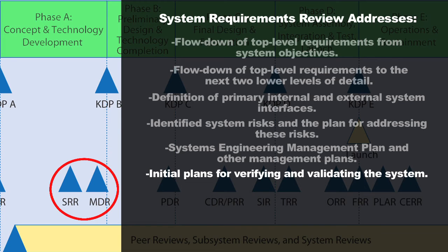As you start to define requirements and objectives, you also have to start thinking about how, at the end of the life cycle, you will ensure the system performs as intended. Will you do that through testing or through computer modeling? You have to think this through early because you might need to build special tools and special equipment to perform that verification, and you need to make those investments throughout the life cycle.